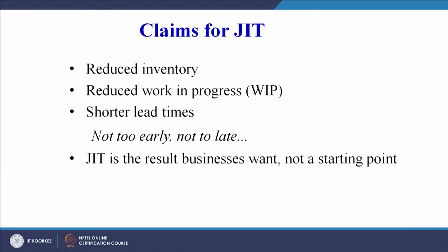Suppose it is required on 30th September and we have received it on 30th of June. So the July, August, September, 3 months carrying cost we have to pay for that material. So whatever material we are procuring must arrive just in time, maybe when it is going to be used, not too early as well as not too late. So JIT is a result businesses want, not a starting point.